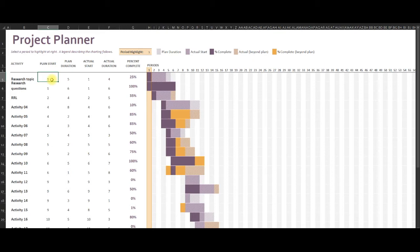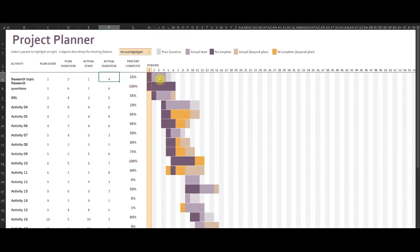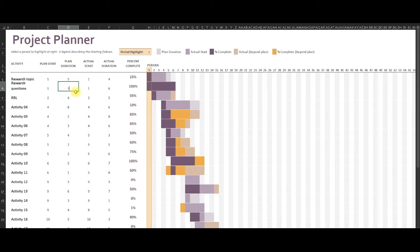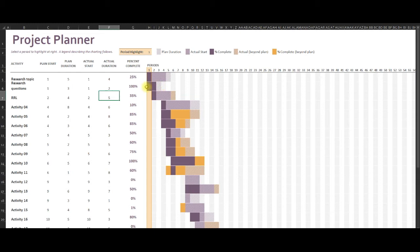So this is the plan duration, where we can set up the periods of time that we want to use. We have the actual start date of whatever we plan to do, and the actual duration. So from here on out, you can see we can actually plan our activity and use the numbers in the periods to indicate how long we plan for that activity to happen. And we have the actual start and the actual duration with which we can properly look if we have followed the plan. That's why we have the percentages of completion.